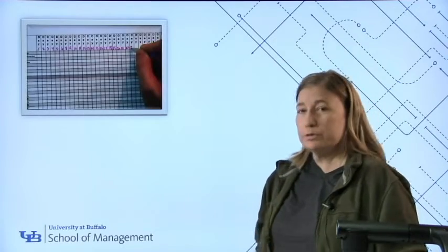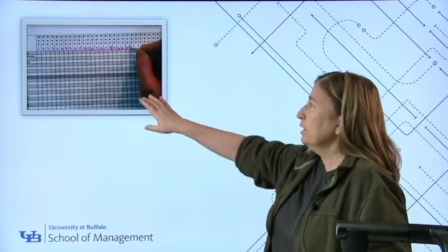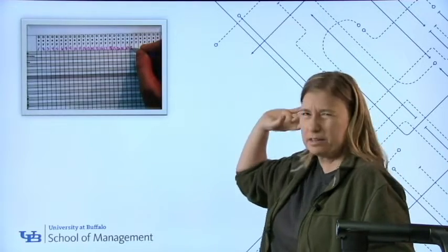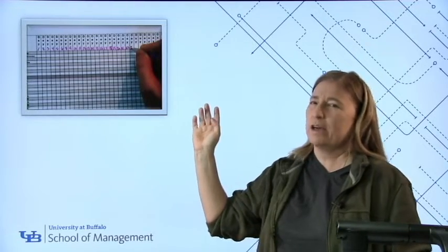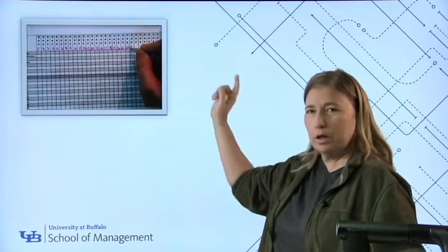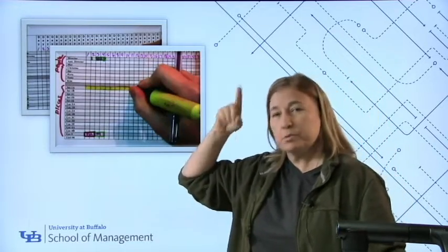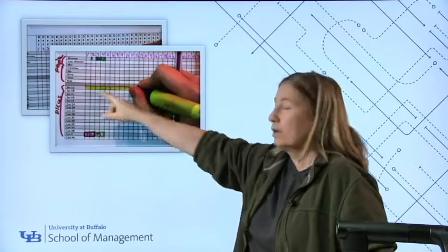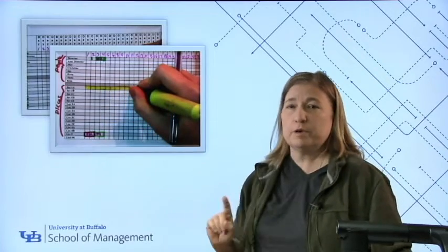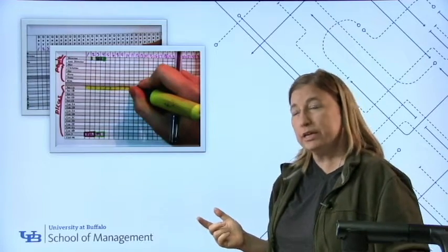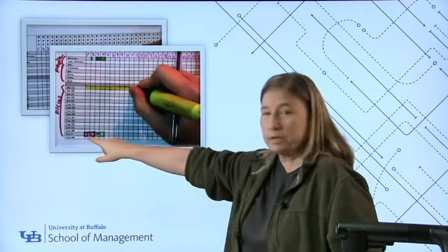So if you were going to do this manually, you'd need a bunch of these blank sheets, right? Because it's only 30-some odd days. It's going to take longer than that. You create one long number line across the top. You start making some decisions, and when you make a decision, you mark the location that's being used and the people that are being used, if in fact any people are actually needed, and you be sure to label it. That's what that writing is.